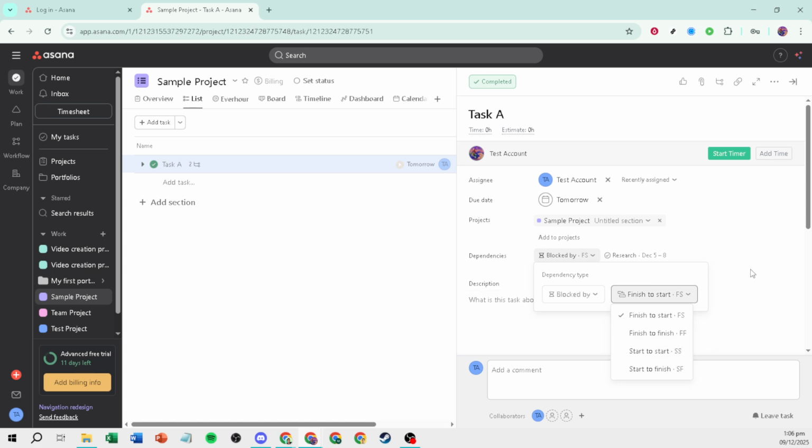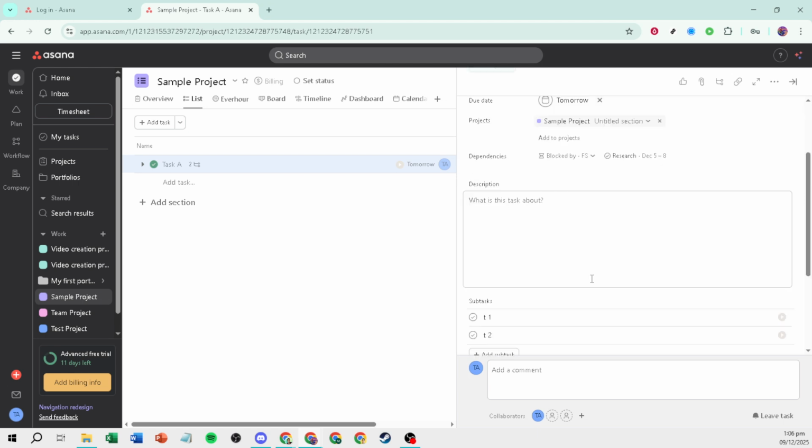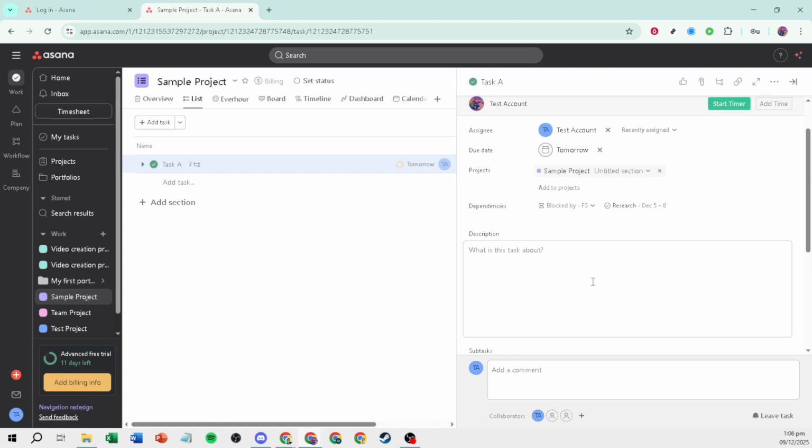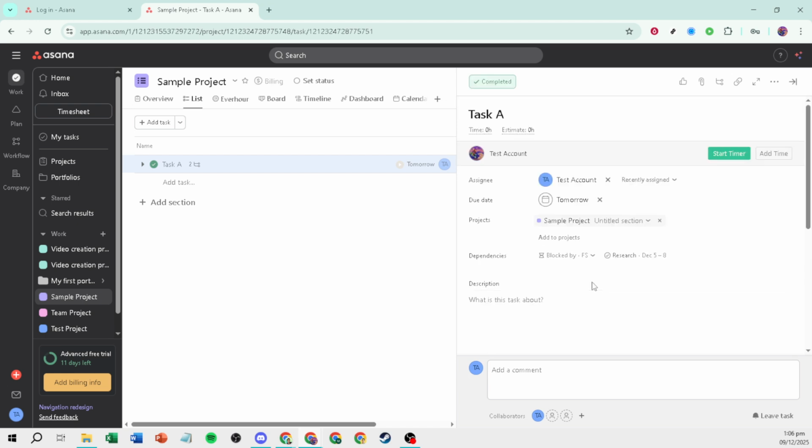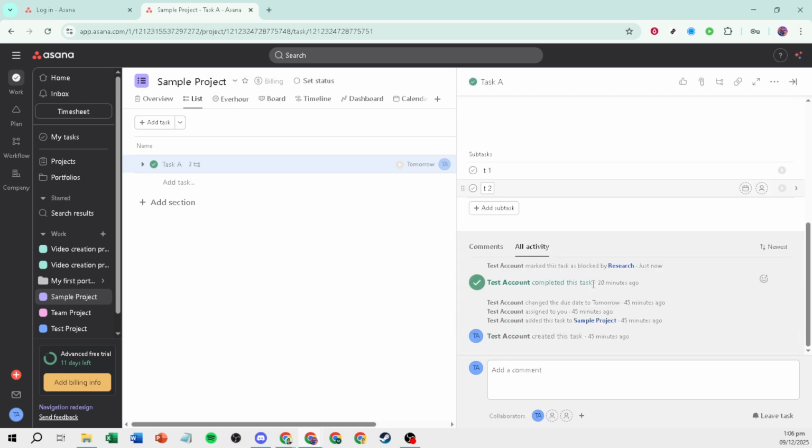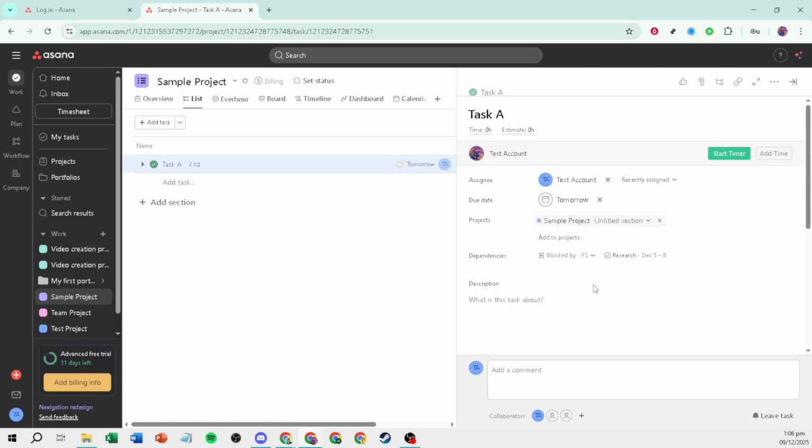Once added, Asana shows the dependency in the task details, and collaborators may receive notifications. If your project uses timeline or Gantt views, you'll see these relationships visually, which makes planning and rescheduling easier. After linking tasks, take a moment to confirm due dates make sense with the new order of work. Adjust dates if needed so the blocked task is due after its prerequisites.